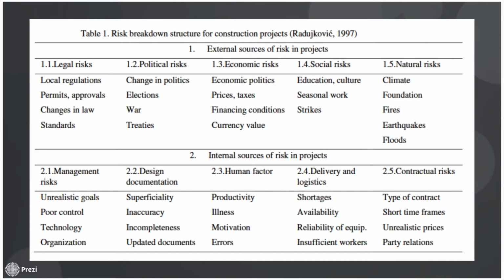This is a risk breakdown structure used in a study determining whether or not project managers can use existing risk management tools to renovate existing buildings, rather than using new risk management tools as in constructing new buildings. They created 2 risk breakdown structures, one for the existing buildings and one for the new buildings, and they compared them and concluded that the risk management tools used for the new construction cannot be used for renovating existing construction.